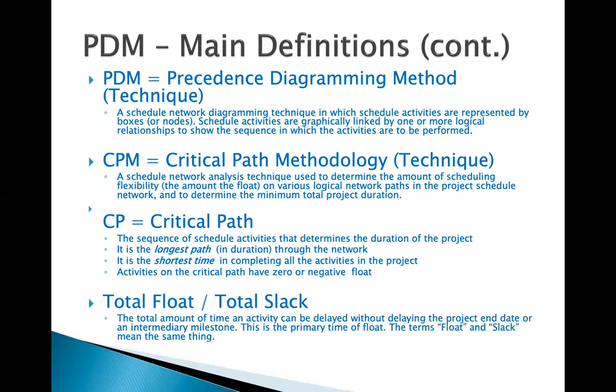The total float or the total slack, which are synonyms, is the total amount of time, as I mentioned before, that an activity can be delayed without delaying the end date of the project.